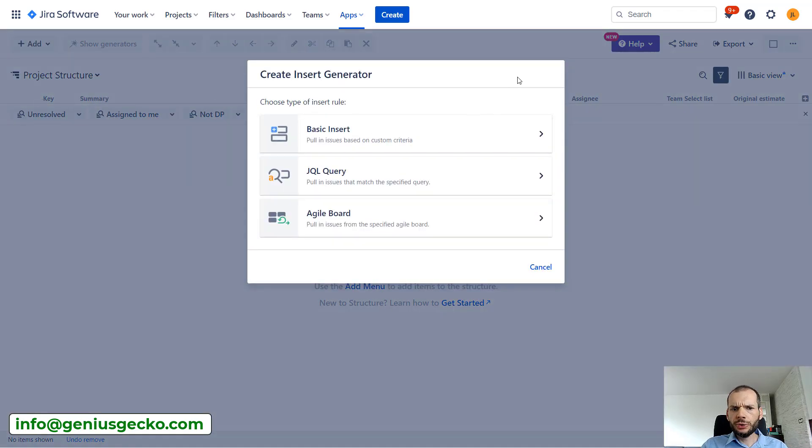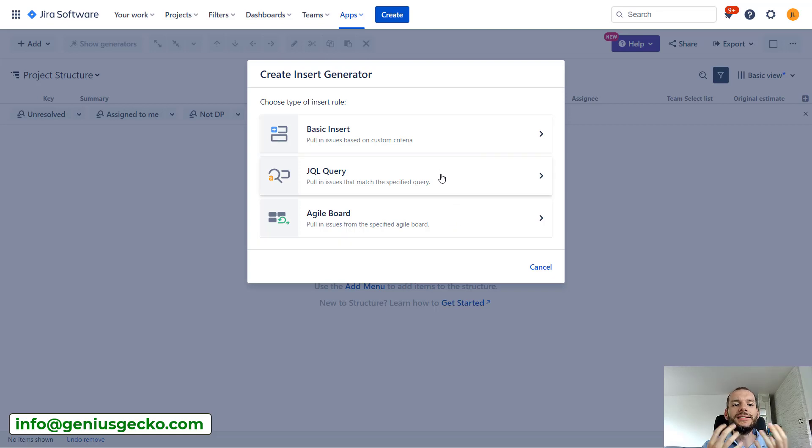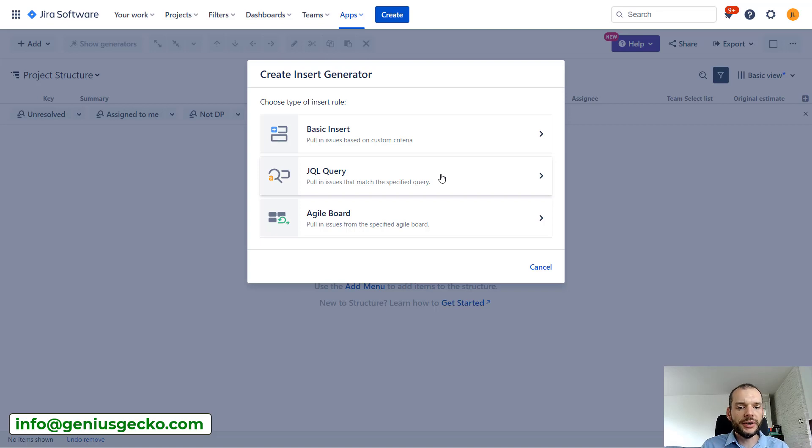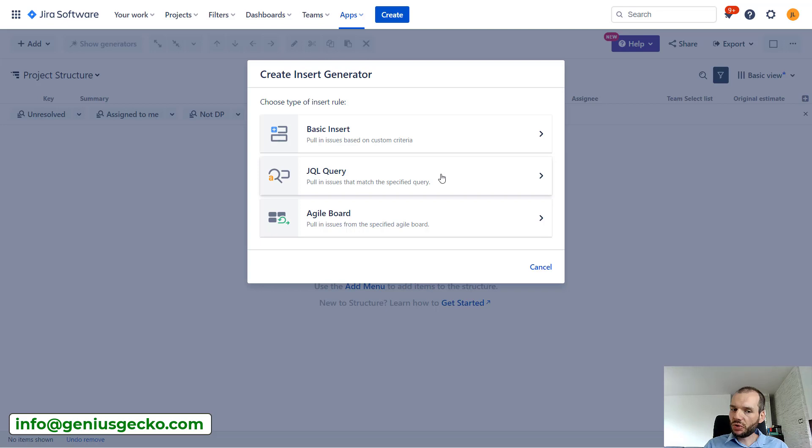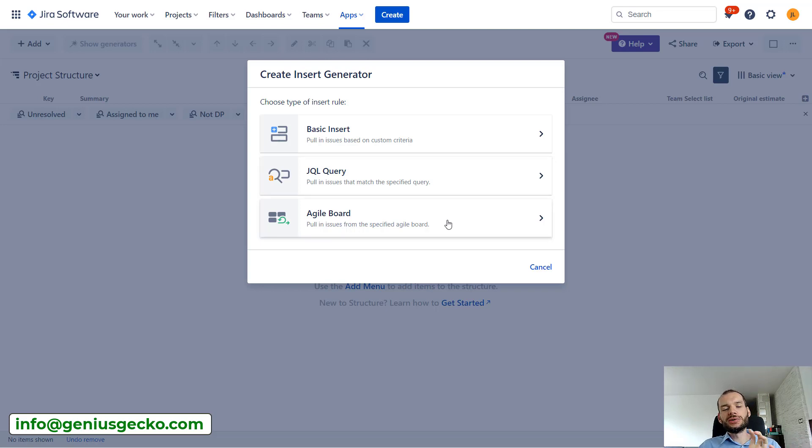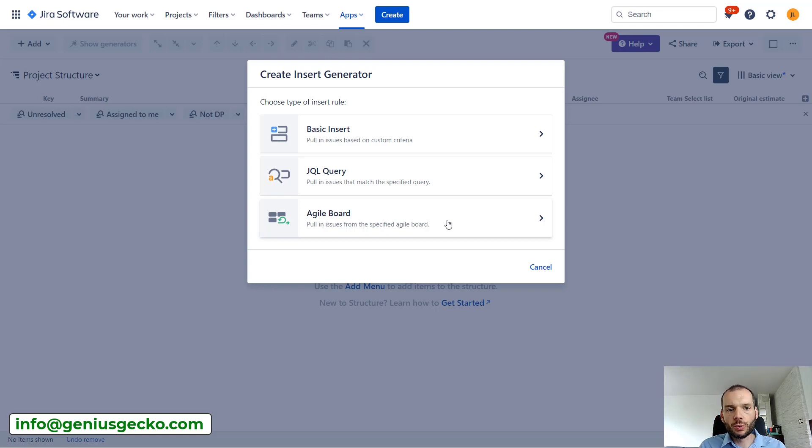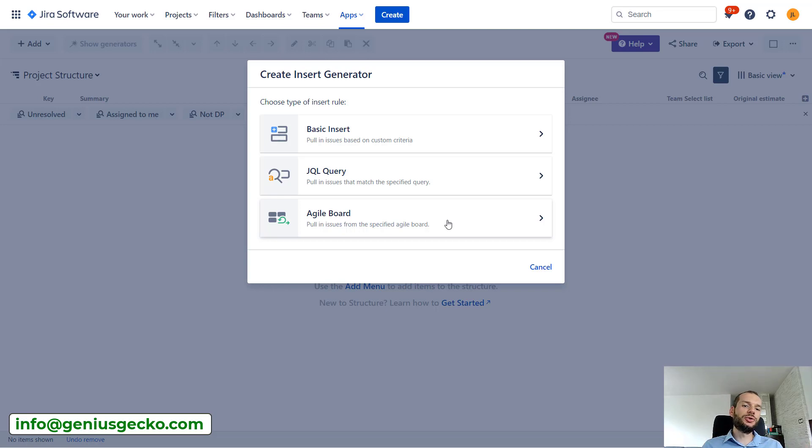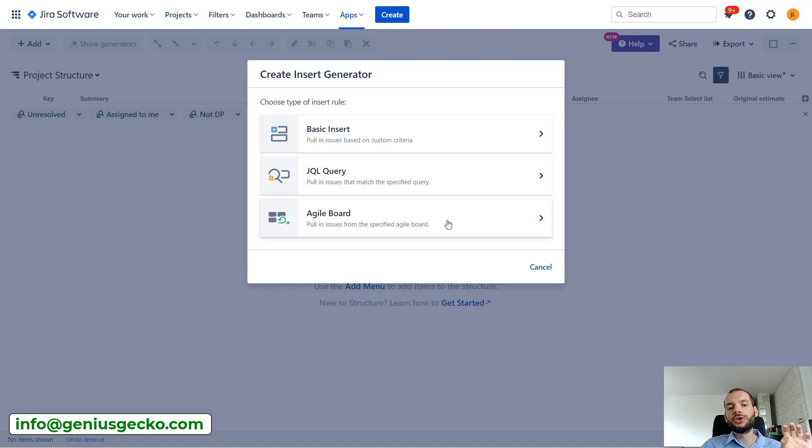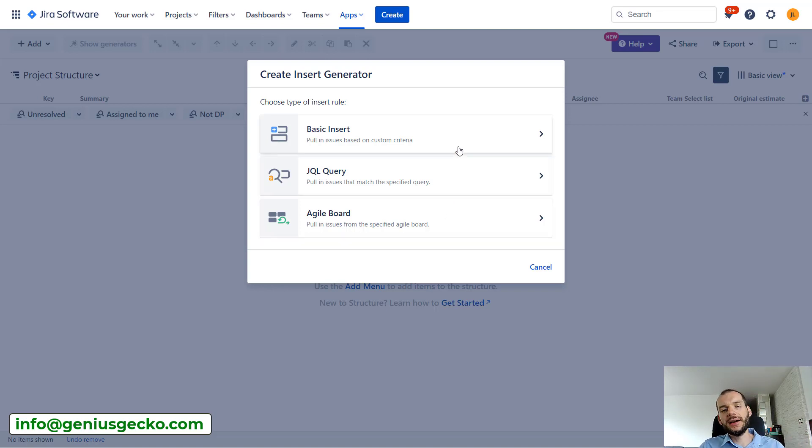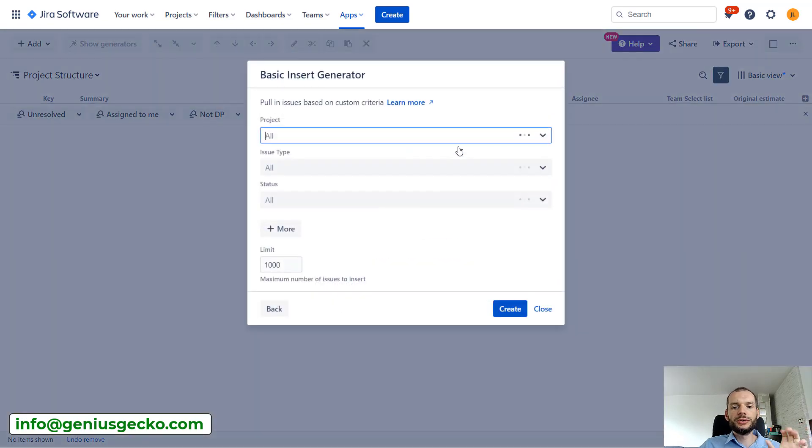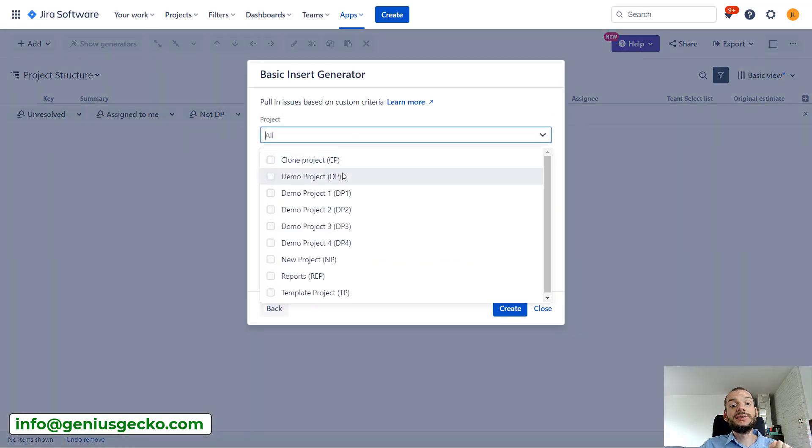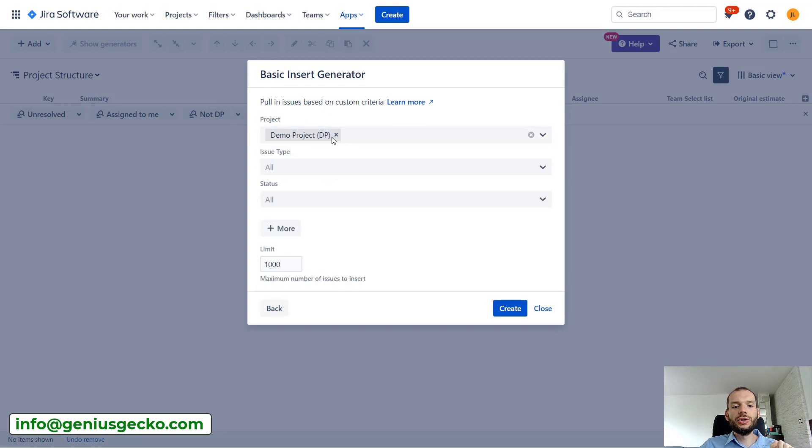We are starting with 'Add' and we want to insert the data into our structure. So you can see over here that there are several options. We could insert the data based on a JQL query, so basically if we have a query that selects the issues that we are interested in, we can just use this query over here. We could pull in all the issues from specific agile boards, so if your teams are working on Jira boards, you can use that so that you do not have to duplicate the query on which the board is based.